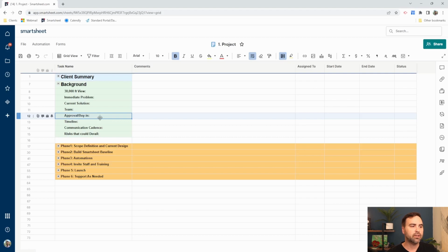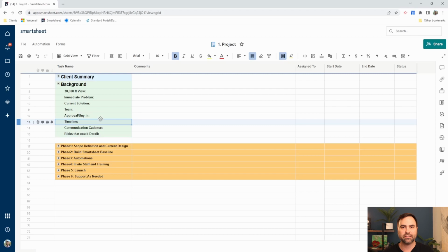And what's the timeline? Everybody thinks that they want this thing yesterday, but we need to be realistic about what timeline we create. So is this timeline going to be 6 months from now? Is it 3 months from now? Is it something that we need a quick turnaround in just a 2-week time period? What this does is allow us to back plan from that goal. So if I get a 6-month timeline, then I'm going to back plan from 4 months out of those 6 months and say, okay, I need to be ready to be live on that 4th month. That way, if there's any slide, if there's any scope creep, I have some leeway to handle that.